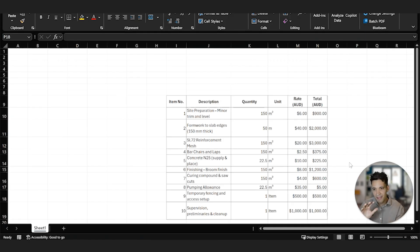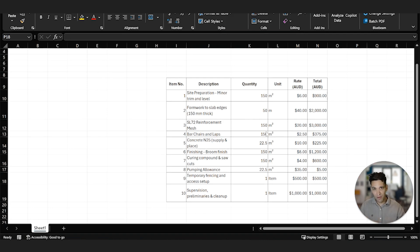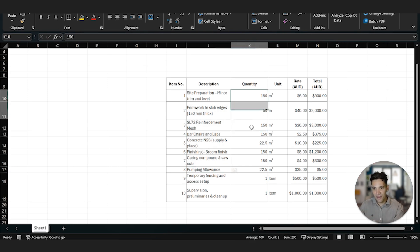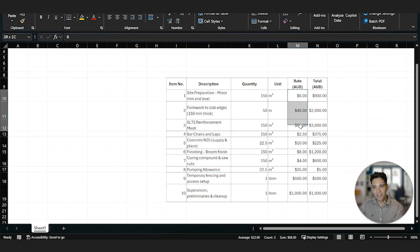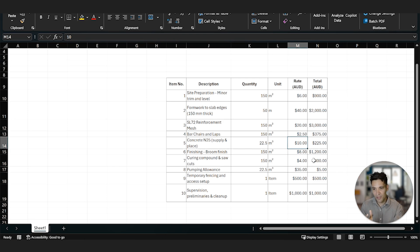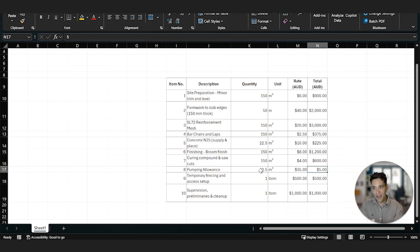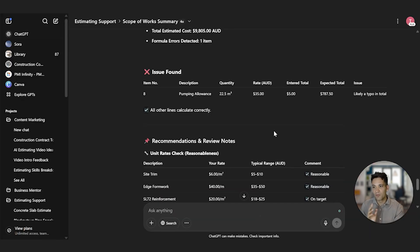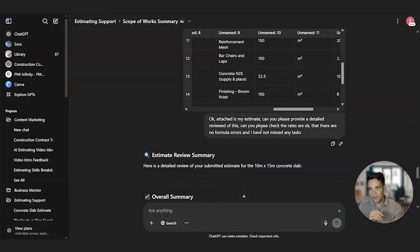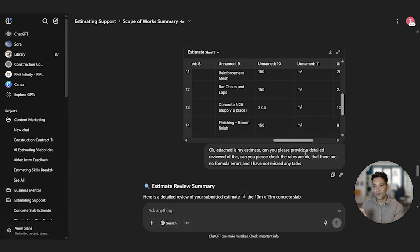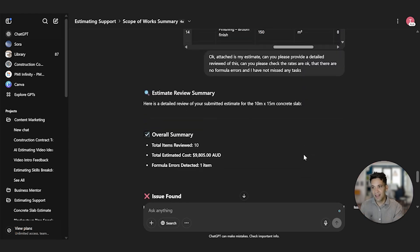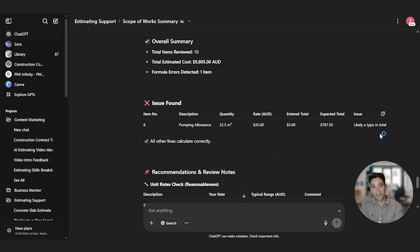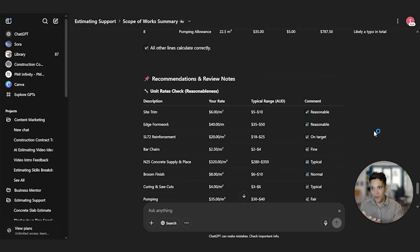So as an example of testing how it can review an estimate, I've put together a really simple estimate for a 10 meter by 15 meter concrete slab. And I actually use ChatGPT to prepare this estimate. It's got all the activities, the quantities, the rates and the totals. Now I've intentionally doctored two things. I made it $10 a meter cubed, the concrete supply, which is way too cheap. And I intentionally put an error in the pumping allowance. So it's not 22.5 by 35. I've just made the total $5. Let's see if it picks up the error. So I've gone and put this into ChatGPT and I've said, okay, attached is my estimate, can you please provide a detailed review of this? And can you please check rates are okay, but there are no formula errors and I've not missed any tasks. It picked up the pumping allowance. And it said the total should be 787.5 and that's likely a typo total. So good job.